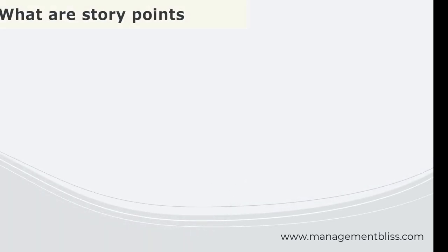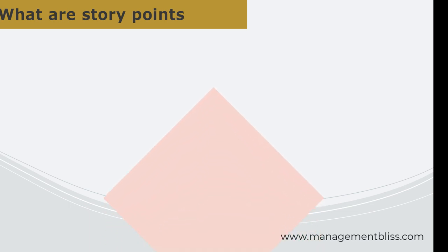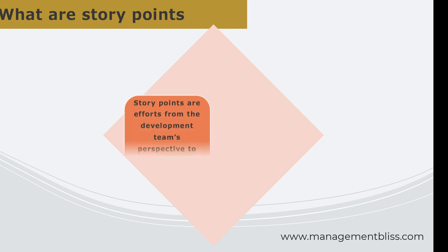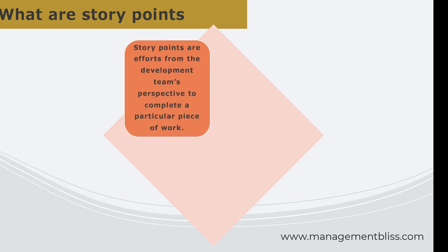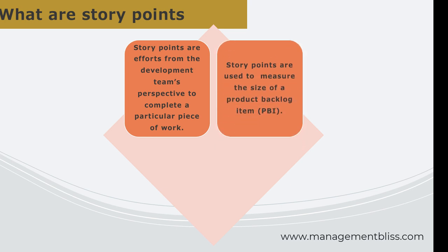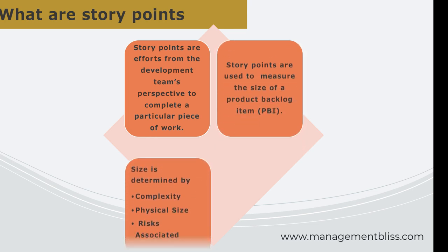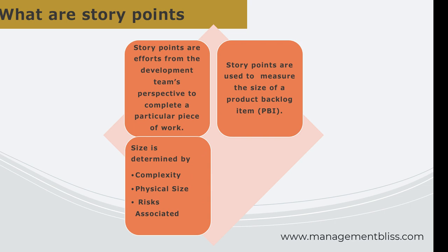So what are story points? Story points are the effort from the development team's perspective to complete a particular piece of work. Story points measure the size of a product backlog item. We can also say that the bigness of any PBI is measured using story points. The measure of a PBI is defined by many factors, like how big the work to be done is, the complexity of the work, and other factors affecting the solution. Therefore, sizing is influenced by complexity, physical size, and the risks involved.